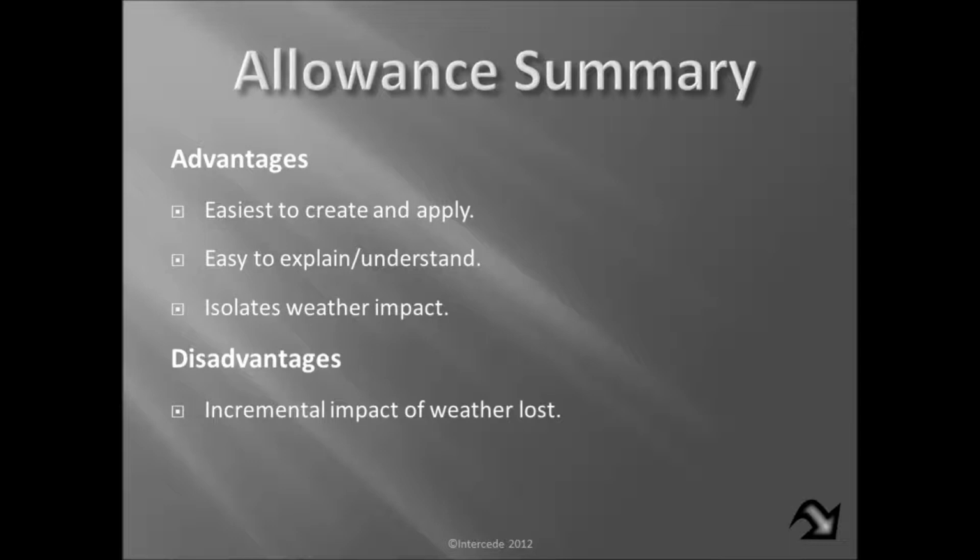So for me, the advantages to the allowance are it's the easiest to create and apply. It's really simple to add that activity. And once you've done that, it's easy to explain and for management to understand what you have done. Now, it also isolates the weather impact, so it's fairly easy, again, for management to understand just how important weather is to the overall successful completion of the project.